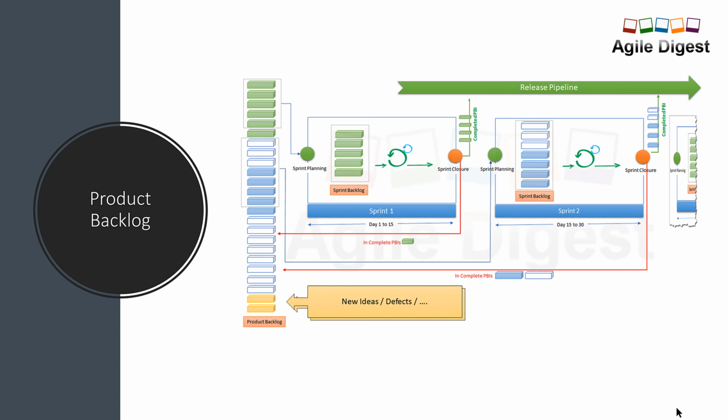If you are able to see this diagram, we have a list of all user requirements, user stories, technical spikes, enablers, whatever you have in your work items, everything gets logged into one area that's called product backlog. And from that product backlog we take a selective number of stories or technical spikes based on the team's capacity and move into a sprint, and that happens sprint over sprint.